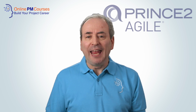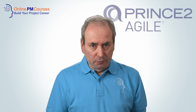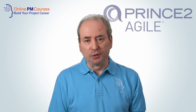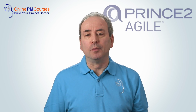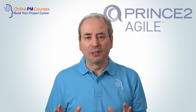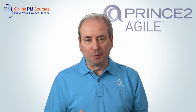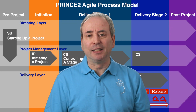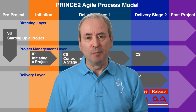This means that within PRINCE2 Agile, you can work with any agile methodology, Scrum, Kanban, or any other methodology you choose. The only requirement is that we need to wrap around them the governance structure and the control mechanisms that PRINCE2 requires. This schematic illustration shows just what I mean.